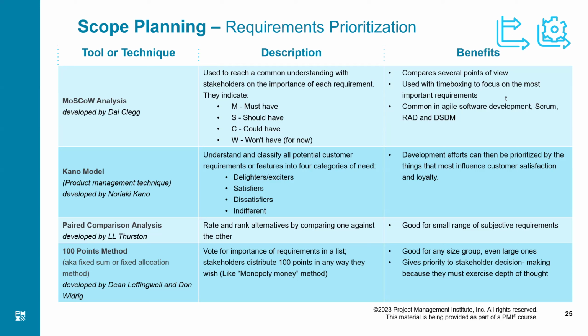But could-haves are very optional. They are the least important from that point of view. But if I am done with all the must-have requirements and should-have requirements, and I'm still left with the time, then I can do those optional could-have requirements.